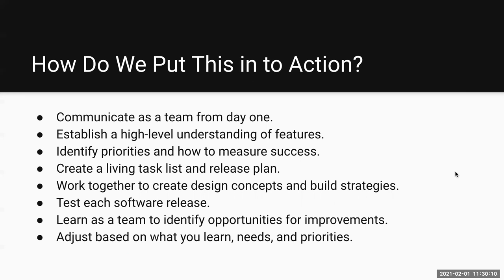Work together to create design concepts. Developers may have some insight for a designer about how something functions or how the community has a component. Go take a look at that component and see if the designer can kind of put some better branding on it, some styling to make it look like it fits within the website. Work together. You want to test each software release by itself, not at the very end, but as you go, because if you identify the little tweaks that you need to make along the way, it's less of a burden. And let's be honest, some features kind of play together. If you address issues earlier, you don't have to refactor throughout the system much later, and you reduce waste there.